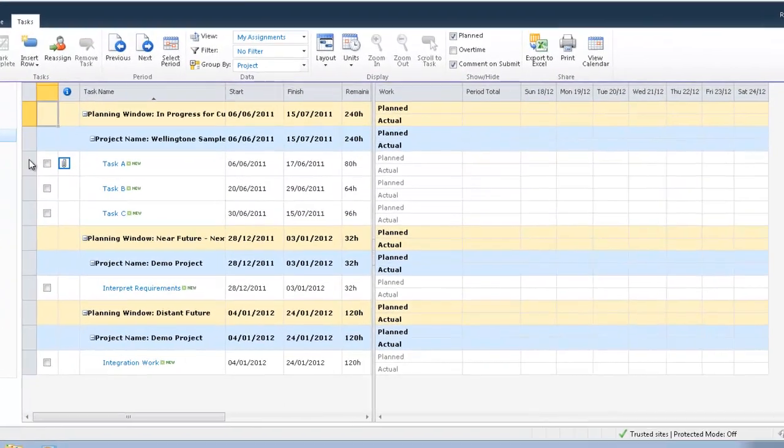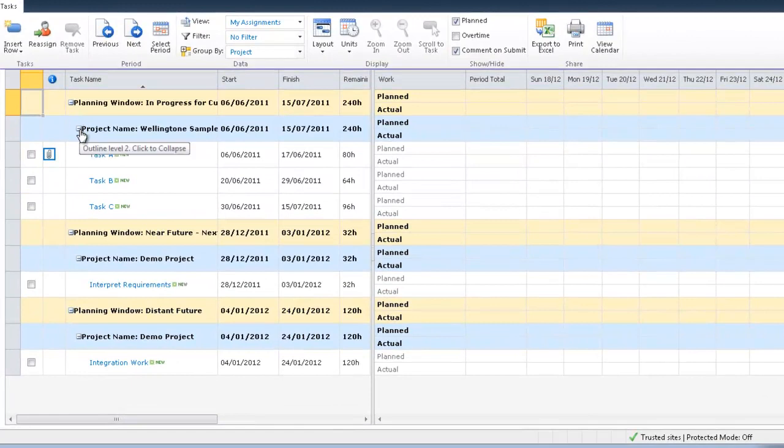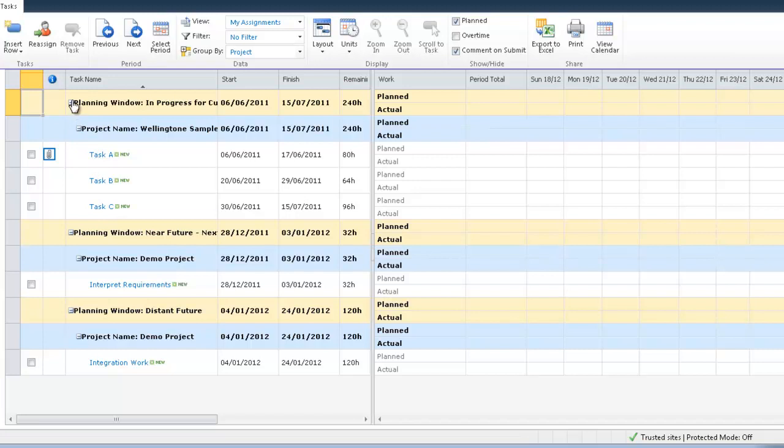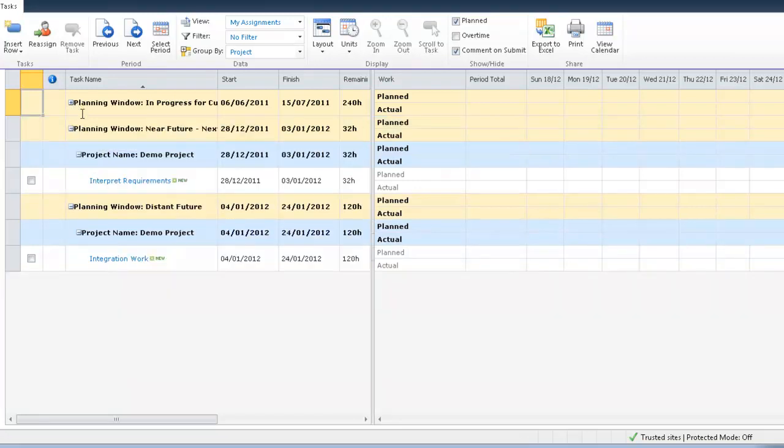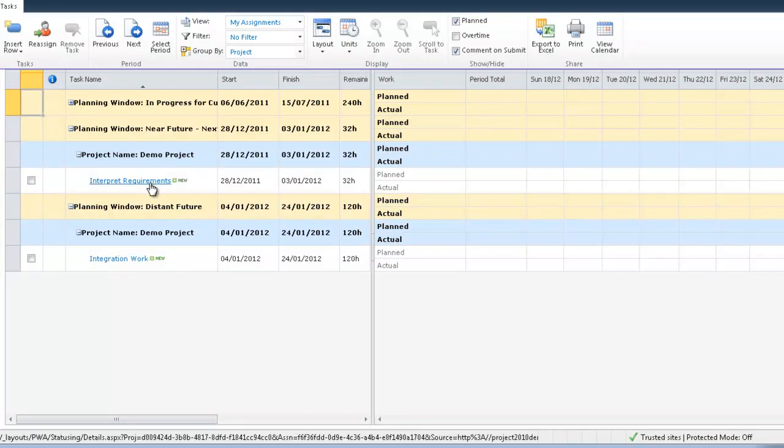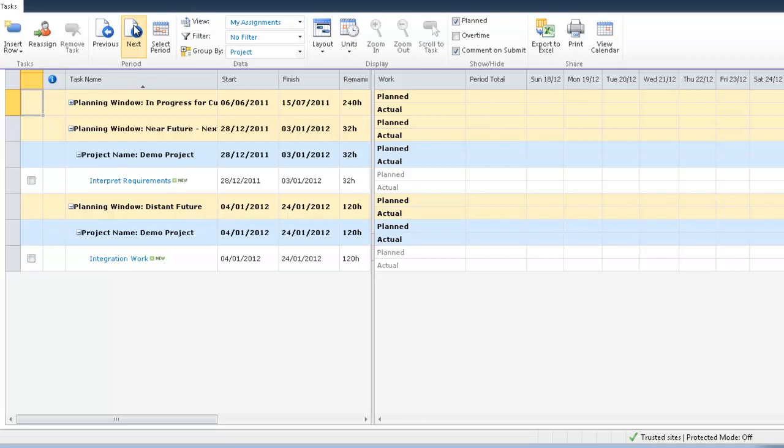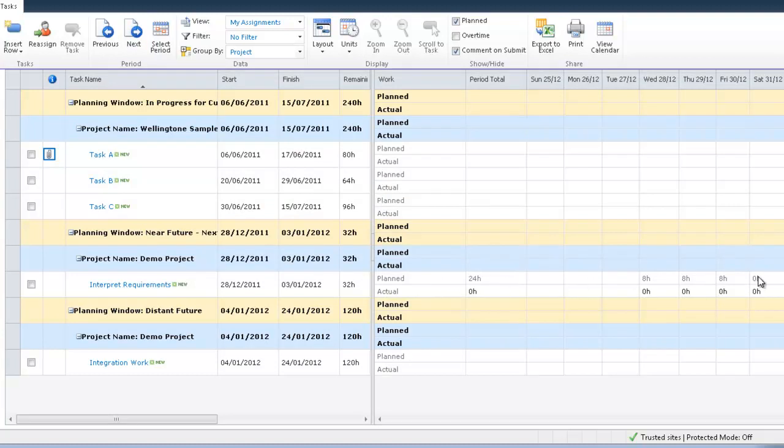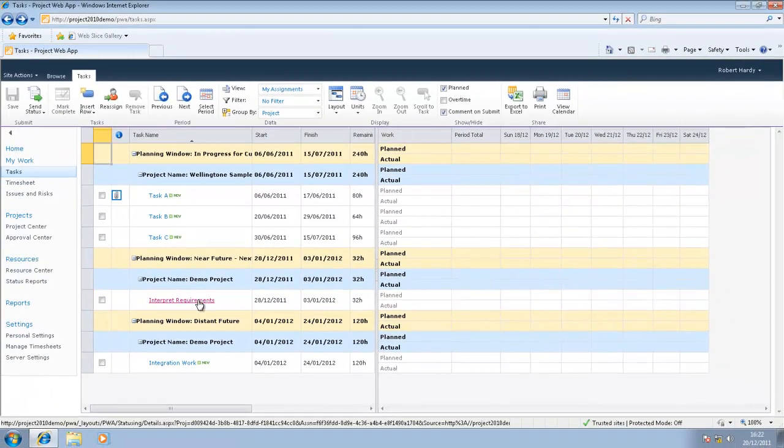In my work, I see a list of all of the work that I've been assigned. I can see which projects I'm involved with and separately which tasks I'm involved with as well. The project that I had been working on, and the one that I built the team within, was a demo project. Here we can see the task that has been assigned. If I click next, I'll go to the right period of time. Here we can see in the calendar view, the amount of work that's been planned. That's 24 hours of work this particular week. And here is where I can come in and put in my actuals.